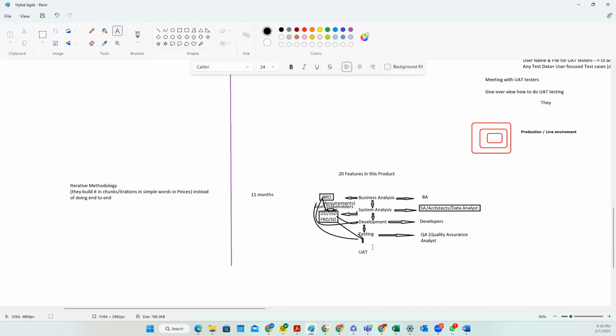Then converting that tricycle to a bicycle will take another 4 to 5 months. So basically the extra cost of that overwork will turn that project into 15 months instead of 10 months, and also inflate the budget, because the whole team has to work again, because whatever change is asked, there will again be analysis, design, development and testing.